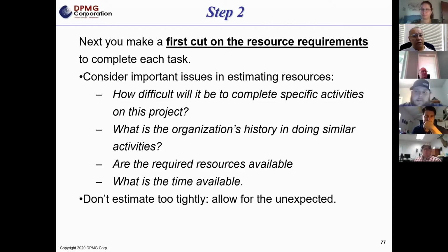This is also the place that we need to start noting if, for example, we're down at the task level, and let's say you go and talk to the person at the task level who's going to be performing, and they give you a rough estimate, you need to ask the question, is there any buffer, right? Because what tends to happen is, as you look at every layer of a project, and if it's real deep, every layer is going to put a little pad to it. So what's going to happen at the end? We're going to have a very large pad, right, to that activity. So we've got to make sure we start tracking that and understanding where it's at, because especially it plays a major role when we start looking at the budgeting side.